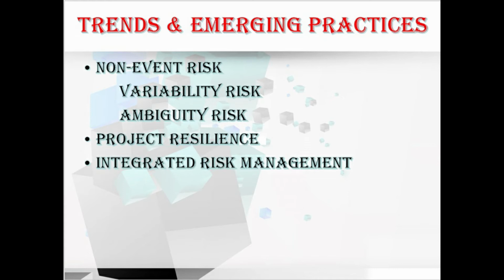Next, let's move to the next concept, integrated risk management. In this, the project exists in an organizational context and may form part of a program or portfolio. Risk exists at each of these levels, and risk should be owned and managed at the appropriate level. Also, some risk identified at a higher level will be delegated to the project team for management, and some project risk may be escalated to the higher levels if it is best managed outside the project.